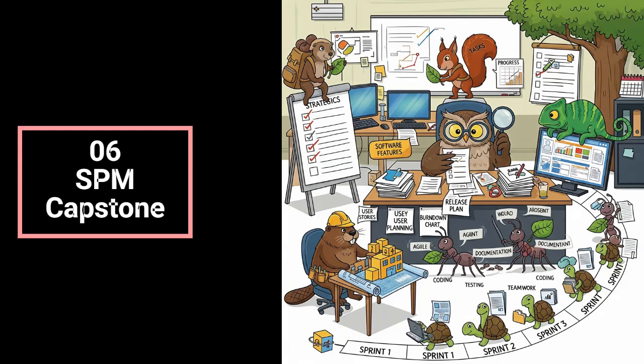Then there's assignment 2.4, the risk plan. Okay. Potential problems. Yeah, and for this, they point to the Agile Planning for Software Products course. Lessons on common causes of failure in software projects. How to assess risks, like how likely is this and how bad would it be if it happened? And then strategies, contingency plans, mitigation. Risk management. It's not just about hoping nothing goes wrong. Definitely not. It's about being prepared, minimizing the damage when things inevitably do go sideways.